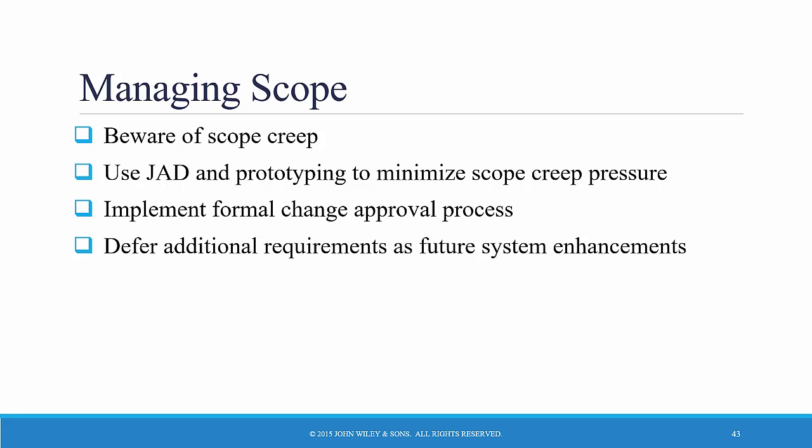Where you get well into a large-scale waterfall system development lifecycle approach, and you're in the implementation phase, and the client — the group you're developing the system for — comes up and says they forgot to tell you early on about another set of requirements that just have to be incorporated. This is always going to happen, and that's one reason why you want to have the requirements document nailed down and signed off on very early, so that if there is an urgent need to address new requirements, the client pays for it. The early documents serve to fence out additional requirements, and this is a very real problem.